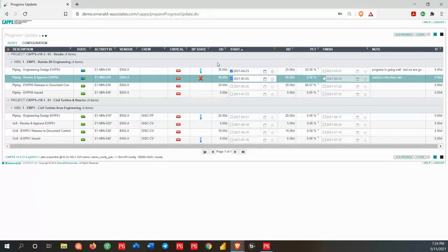Okay, so we've got a few activities that have started in the last few weeks, have been submitted. So I can update the percent completes and the remaining durations on these activities that have already started. I can also start some additional activities. Okay, so I'm going to go ahead and do that.